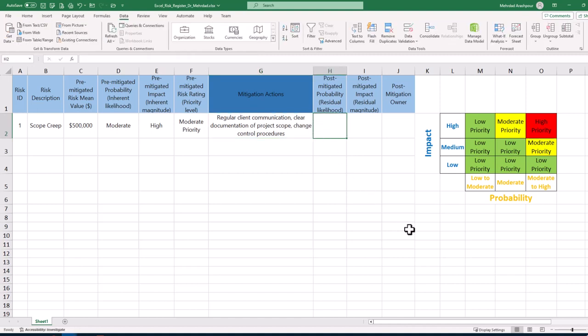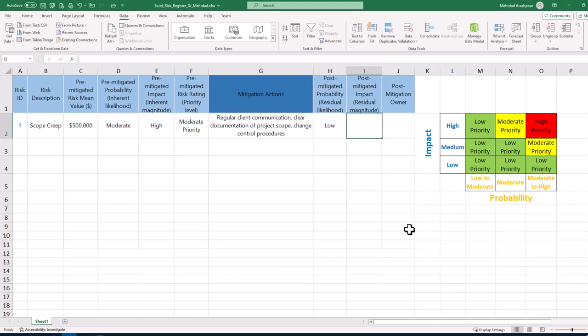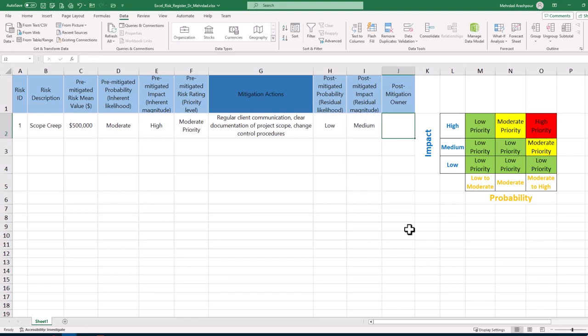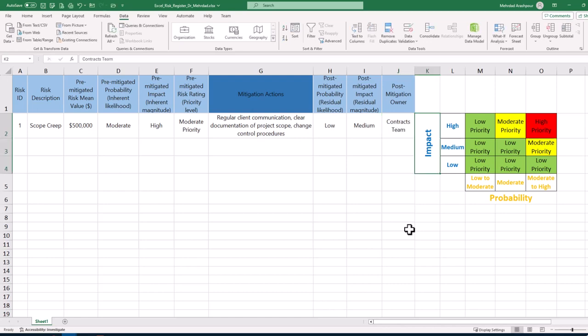Post-mitigated probability or residual likelihood is the remaining level of chance for a risk event after mitigation measures. Similar story about residual magnitude or post-mitigated impact which can be identified using a new risk matrix or based on the pre-mitigated one. Lastly, teams or individuals responsible for overseeing and managing a risk after mitigation actions are identified.